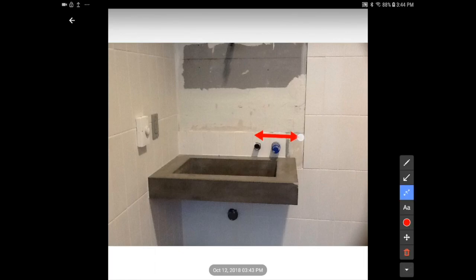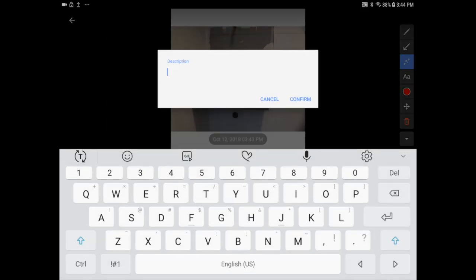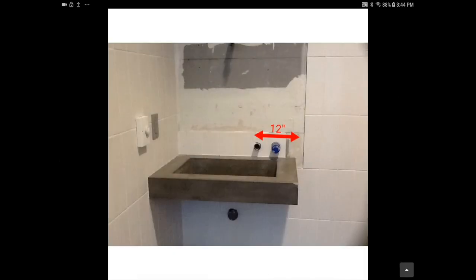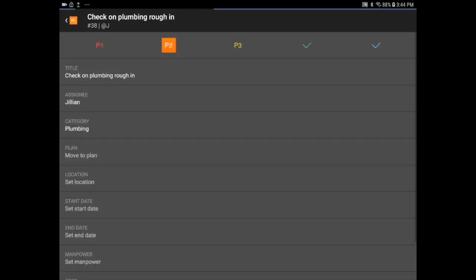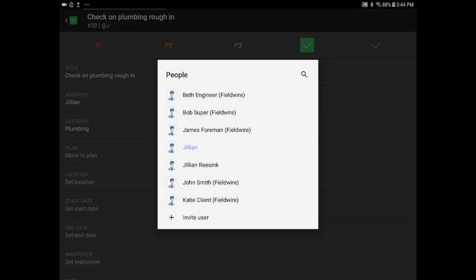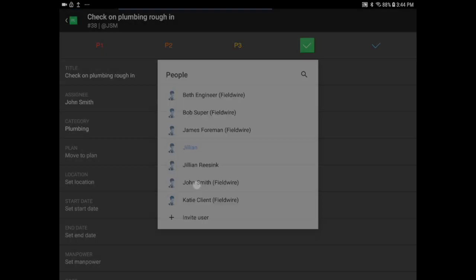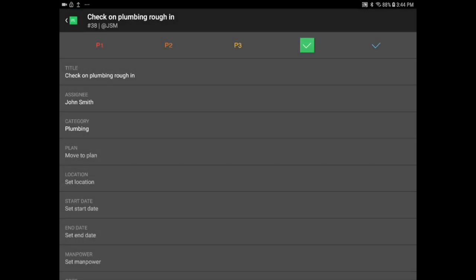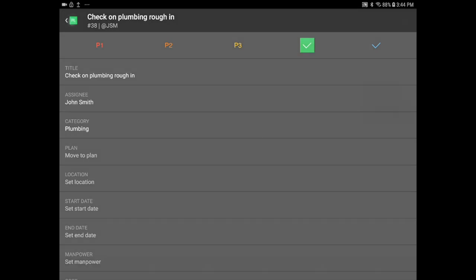Let me add a photo and mark it up with the dimensions. Then I'll mark it as complete and assign it to my QC manager, John, so he can go and verify that the work has been completed per plan.